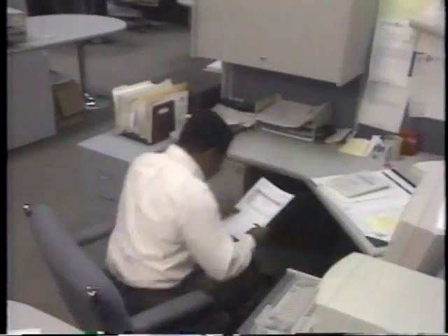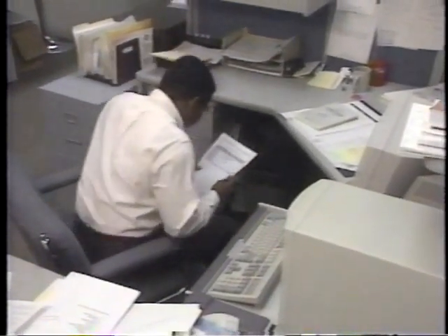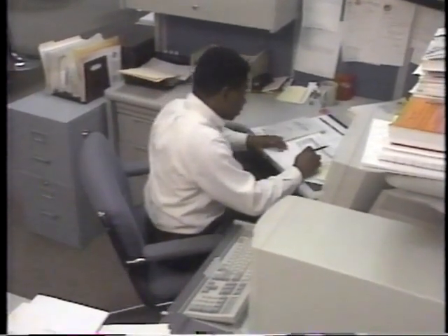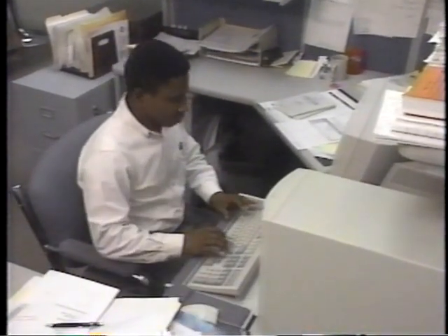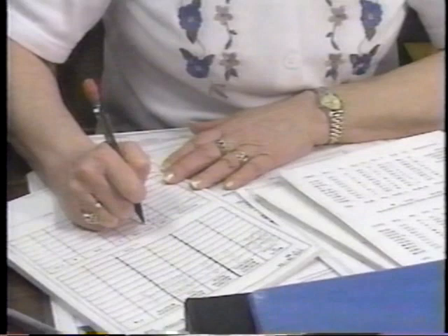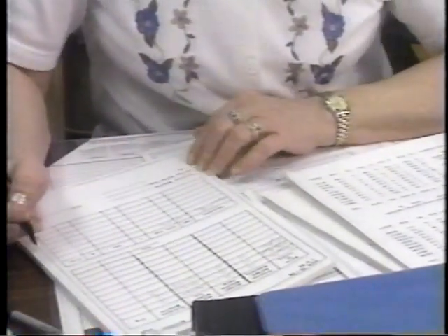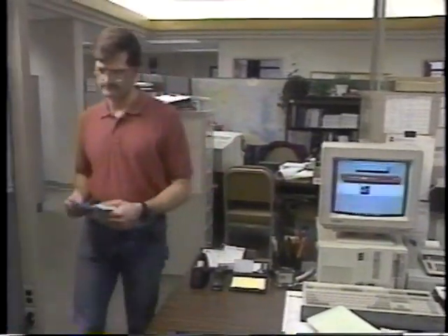In the reporting and monitoring procedure, manpower data are tabulated to provide for evaluation and control of manpower usage and work performance. Procedures and forms for work reporting and monitoring must be developed. Procedures must be developed for controlling by activity or contractor operation, and monitoring and controlling at the engineer in charge level. Man-hours used on each contract must be reported accurately.